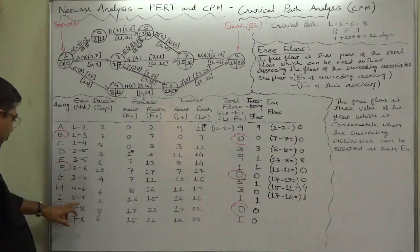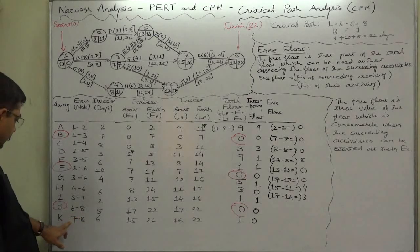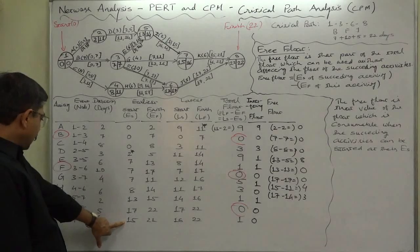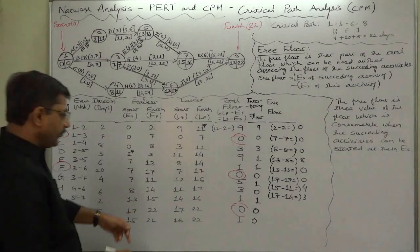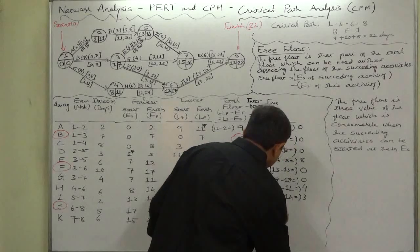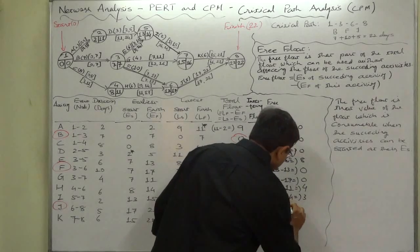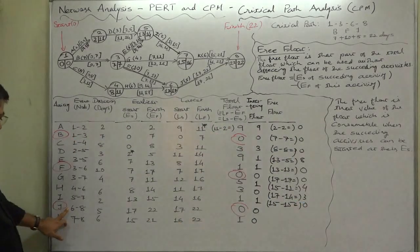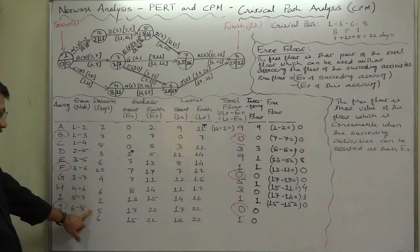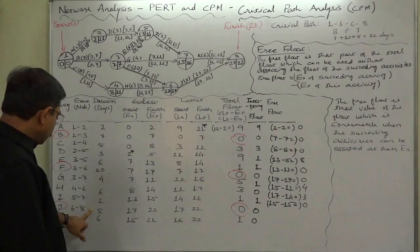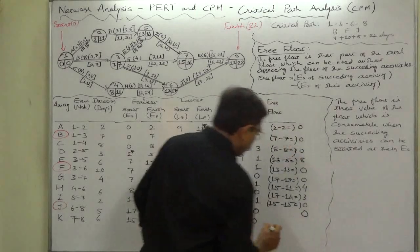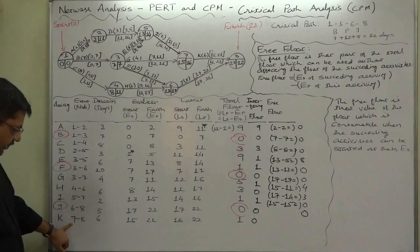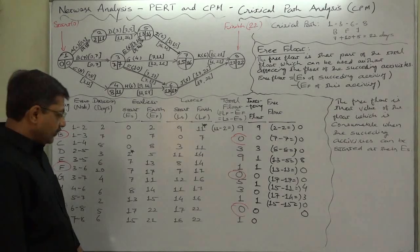For activity I, its succeeding activity is K. Earliest start time of K is 15 and earliest finish time of I is 15, so 15 minus 15 equals 0. For activity J, it has no succeeding activity and J is a critical activity, so its float is zero.